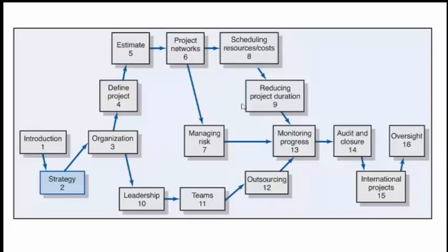Another way could be allocation. Somebody has allocated you, let's say 1 crore rupees or 50 lakhs. Then you need to break it down into analysis, design, coding and testing, and then implementation. Then you have to allocate to each of those phases a certain percentage. For example, coding and testing might take 40% of your effort, so you allocate 40% for coding and testing.